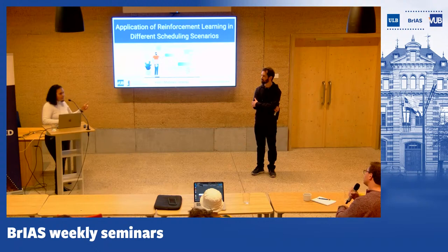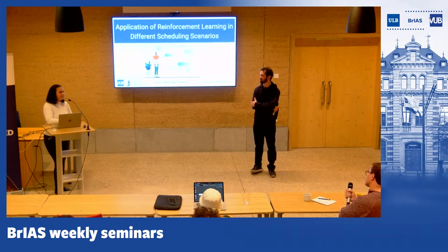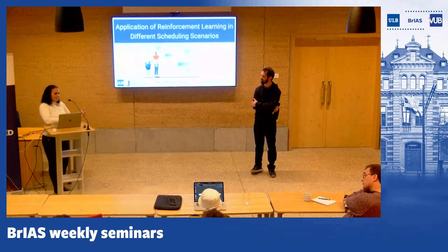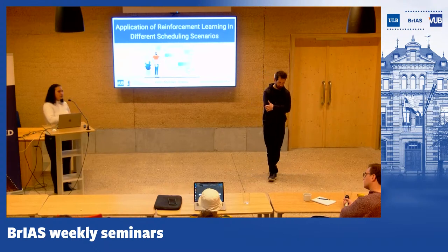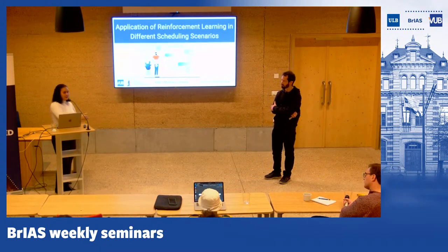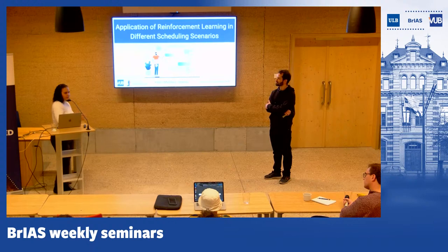Well, in this version, not, but we did some experiments with that. In the end, the papers we have just introduce some slack time, and we let the machines use this slack time in order to absorb the perturbation. It's just some part of the time that you had scheduled. So if the perturbation lasts 3 hours and you had only 1.5 as extra time, then everything will be delayed.